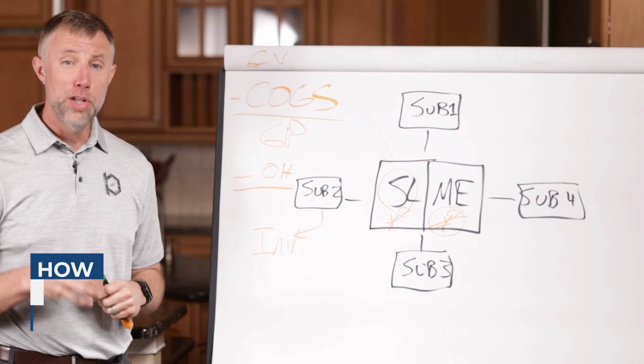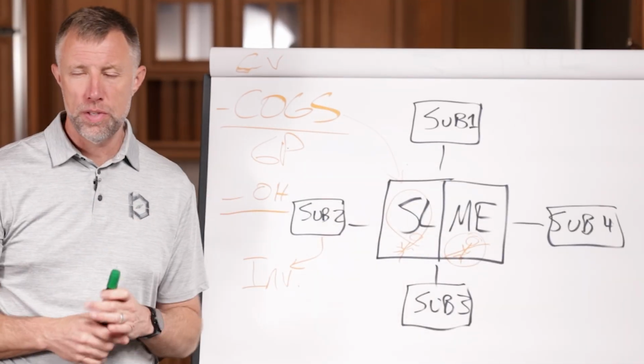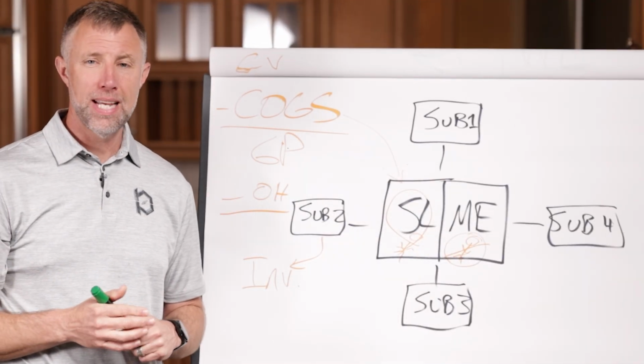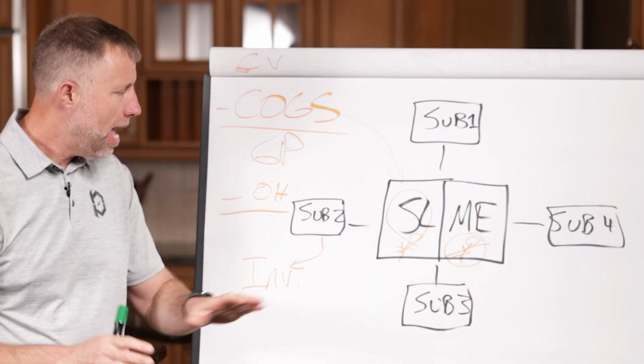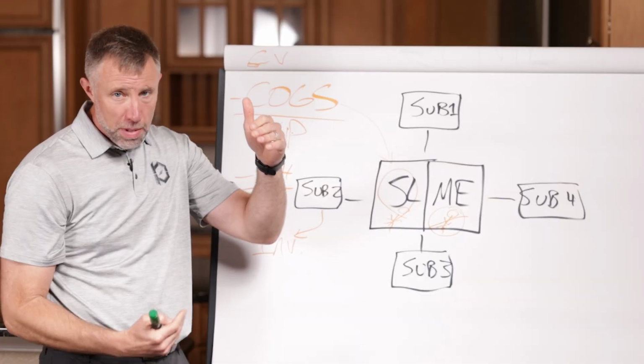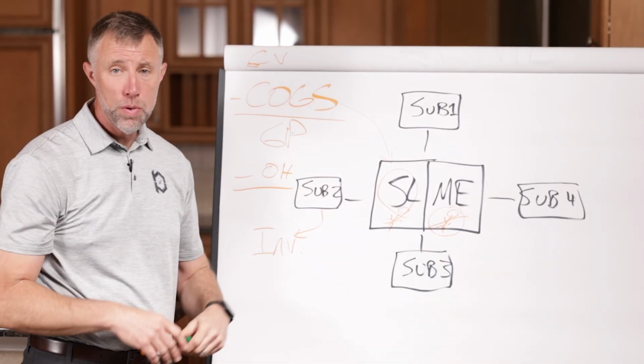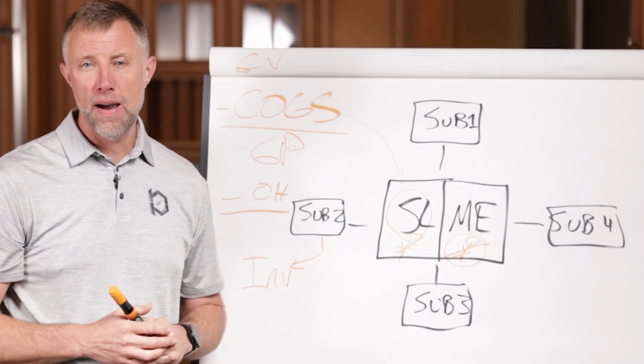And one of the systems is your financial system that houses how to track your job costing and all of these other things. So you need to make sure to spend time there, because once you understand how to manage your subcontractor cost by taking all their invoices, lining them up, subtracting that and making it part of your cost of goods, subtracting that from your contract value, that will help you to determine job profitability.